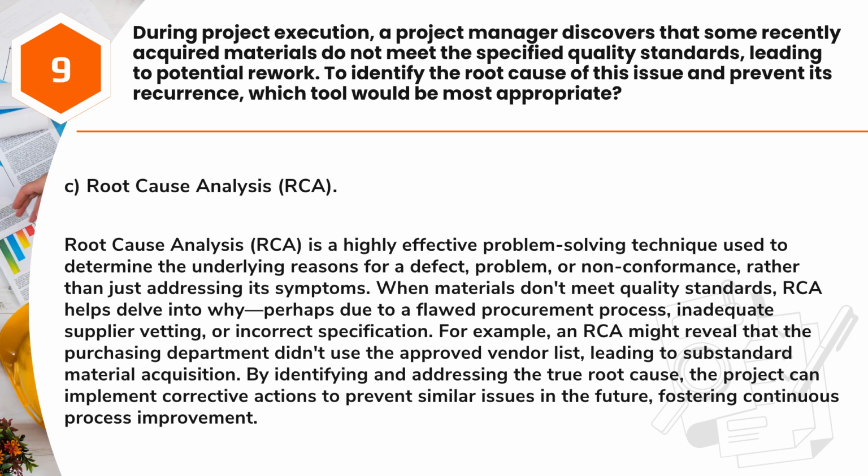Answer: C. Root cause analysis, RCA. Root cause analysis, RCA, is a highly effective problem-solving technique used to determine the underlying reasons for a defect, problem, or nonconformance, rather than just addressing its symptoms. When materials don't meet quality standards, RCA helps delve into why, perhaps due to a flawed procurement process, inadequate supplier vetting, or incorrect specification. For example, an RCA might reveal that the purchasing department didn't use the approved vendor list, leading to substandard material acquisition.